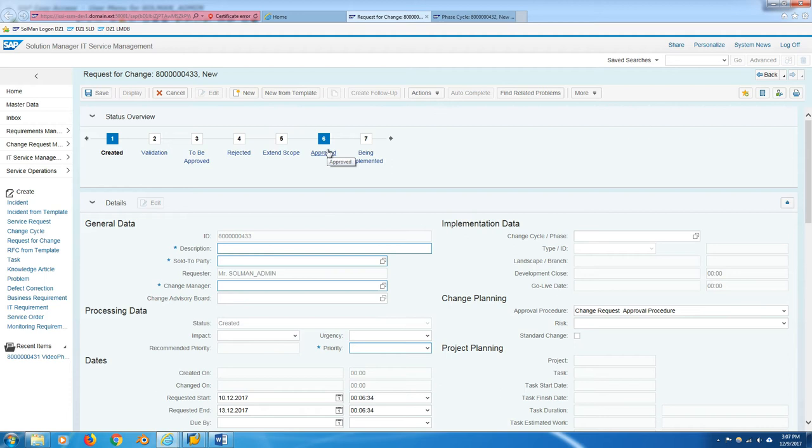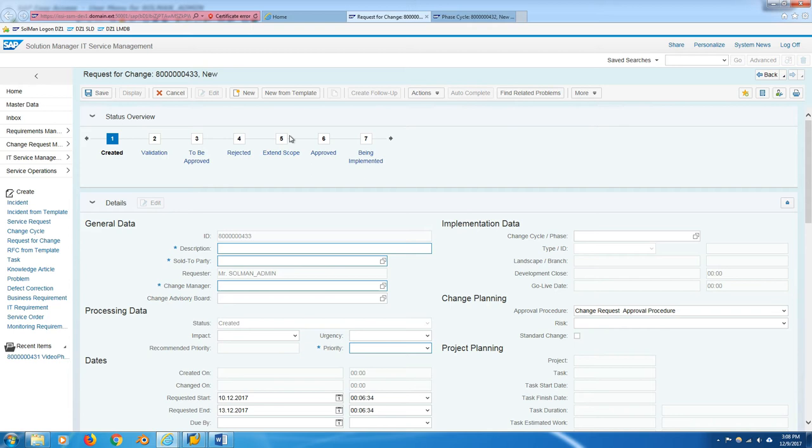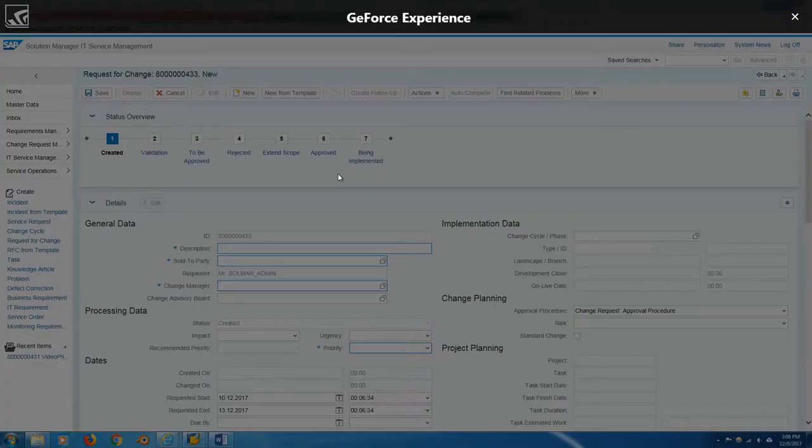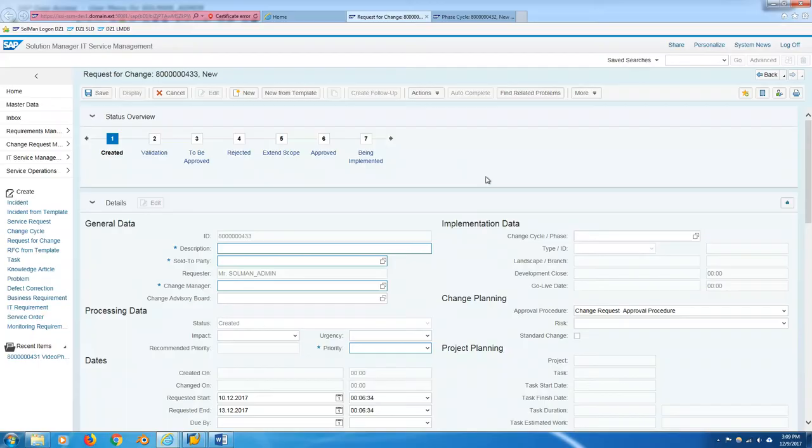So either normal change, standard change, urgent change, general change, any of those. And they press approve, and then it actually moves into approved. Once you've actually created and started adding things to your normal change or your standard change, this will switch to being implemented. And it sort of stays here until you want to close off the RFC and not allow any more change documents to be connected to it. If you do actually decide that you want to save your system, you want to save the logistics and not create another RFC with the change, you can actually set it to extend scope, in which case it works as if you're back in validation, and then you can create scope items with new standard or normal general changes.